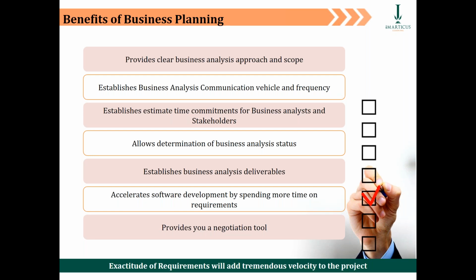Third, you estimate your time commitments with your stakeholders. This project is not endless. If you say that you need to generate certain requirements from the procurement module, sales module, finance module, you need to have a certain timeline. Those activities and the timeline for each module, which you use to capture requirements, are part of your requirement plan.